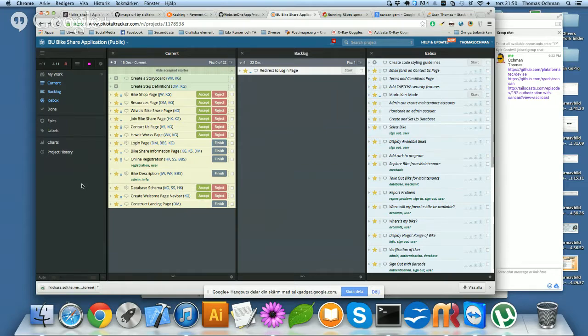So as soon as you feel that yes, I have to create a new spec, I have to test this extensively, then it's automatically a 3-point story for me. 3-point stories are stories that require a lot of testing. There are several methods that need to be created, or a new model, new migration. So there will be tests written both on acceptance level and on a unit level. That would make it a 3-point story for me.